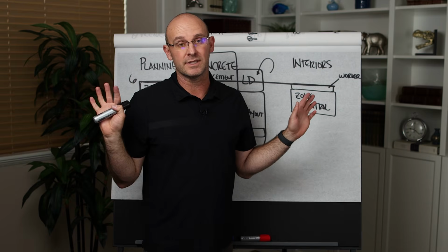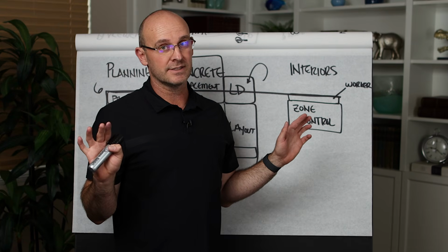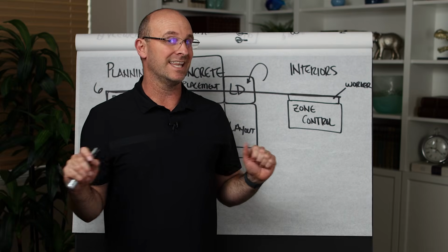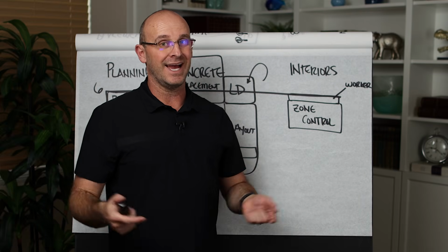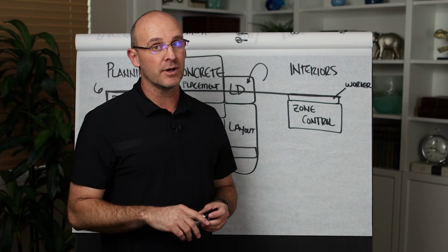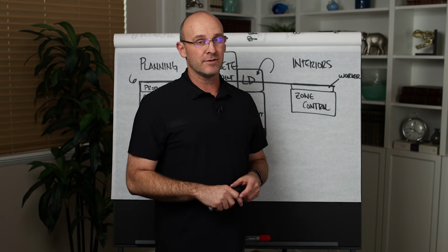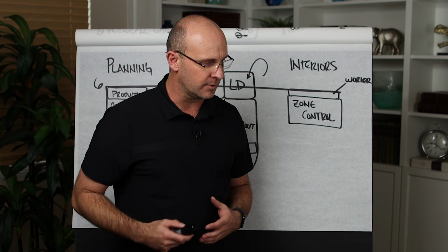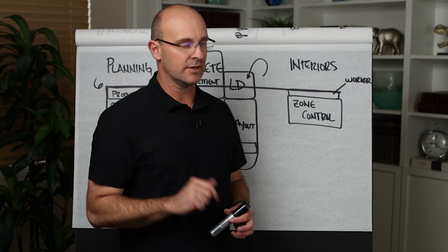None of this punch list at the end of the job. In fact, I can just go ahead and say that right now. We do not want a massive punch list. I'm going to delete that from field engineers' tasks. Now, there is some amount of punch list, incomplete work list, if something's missing, but basically if we have a contractor working in a zone about to finish, let's have them punch it out right there.